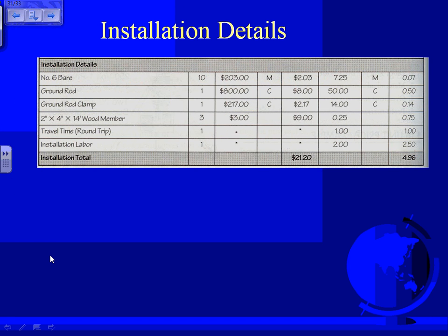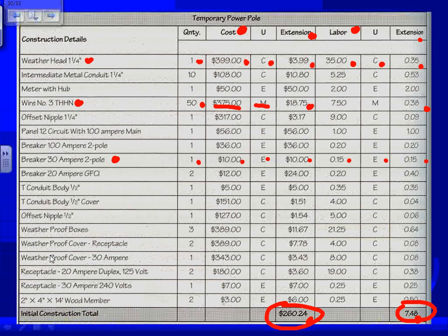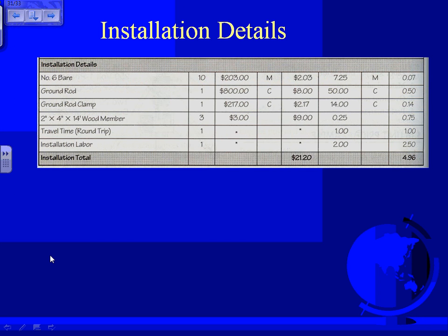Then, look what they did. This stuff, guys, is going to stay for, I think they're assuming 6 installations. They're assuming that you are able to use this for only 6 times. Every time you mount them, dismount them, and dismantle, what's going to happen after 6 times? It's going to fall apart. They're going to start building that from scratch. That's the assumption. Then these items you need every time you install it. Every time you install it, you need to do all this. That's why they put them separately. This is called installation detail.